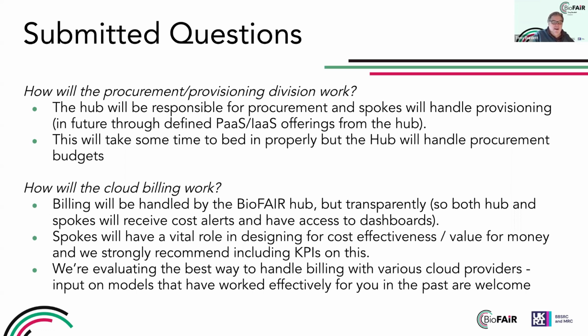We can do some back of the envelope calculations, and we have an allocated budget on the basis of that. But we need to understand what the spokes really need to deliver their services. And I guess the spokes will learn, and this will evolve over time, depending on the success of the initiative. The more users we have, the more compute we're going to need. So procurement is the responsibility of the hub. Provisioning will essentially be the responsibility of the spokes. But we hope that will go through defined platform as a service, infrastructure as a service offerings from the hub. But it's going to take some time to bed that in properly.